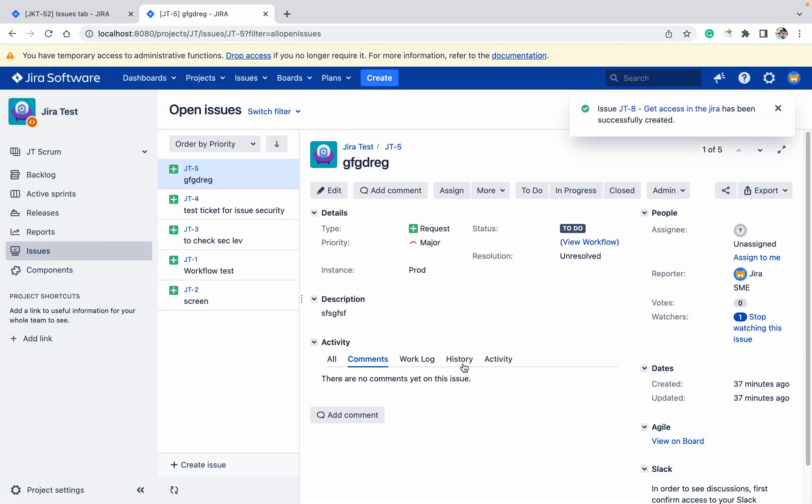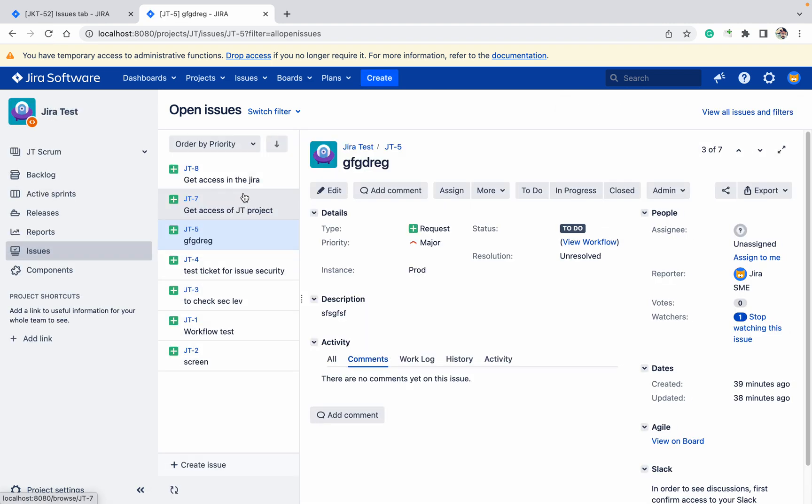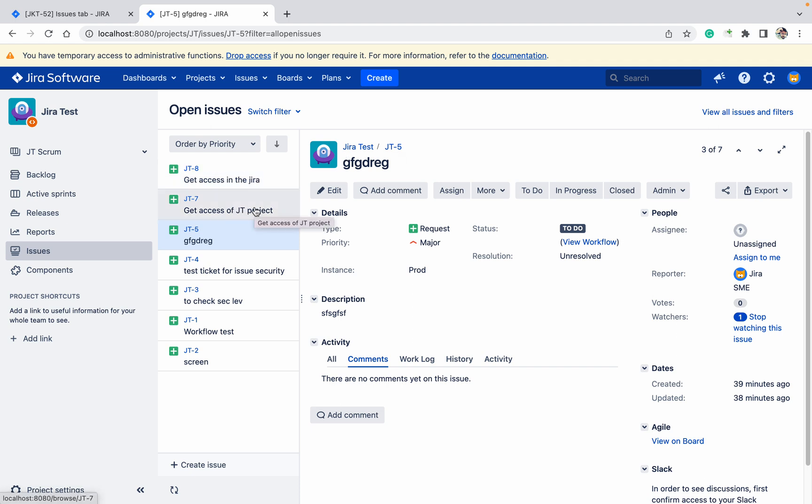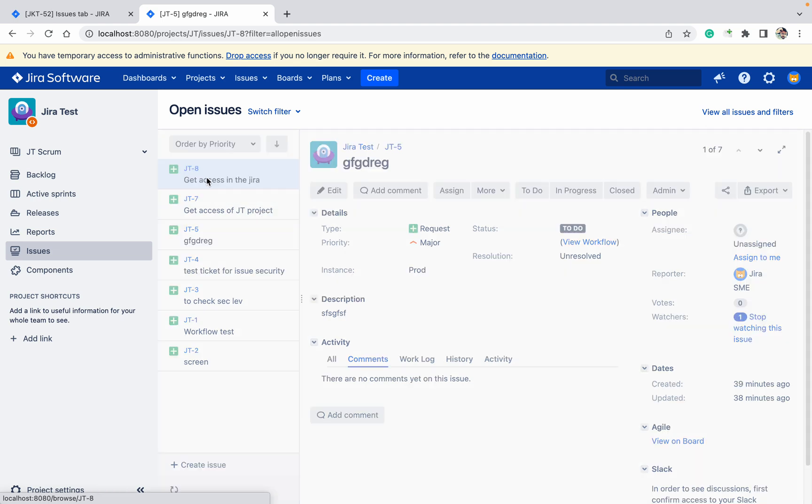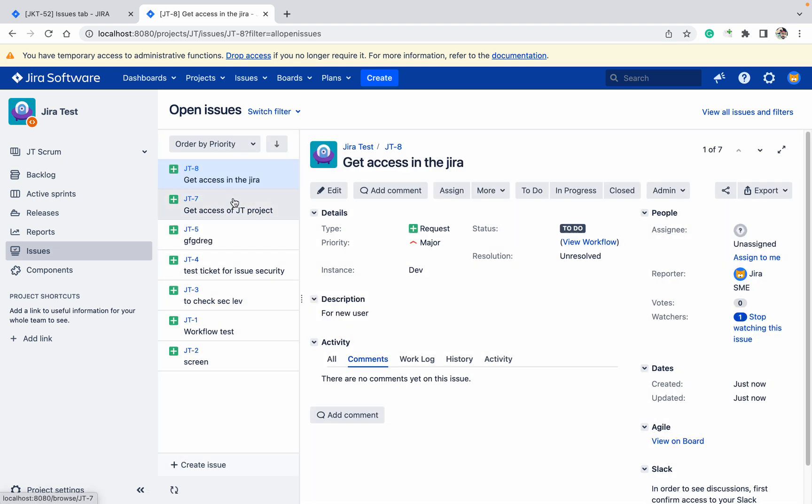These two tickets got created for the same user. Which will come first? Will you be able to provide access in the project directly? No, the user account should be available first, then only you can provide access in the project.